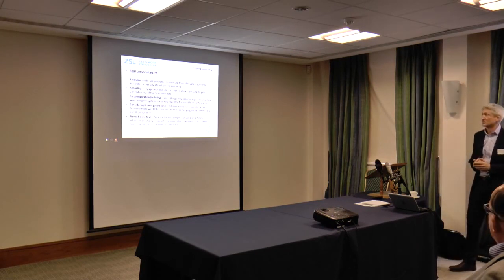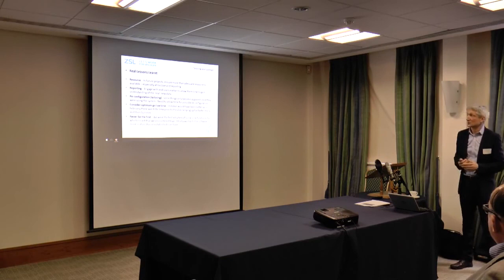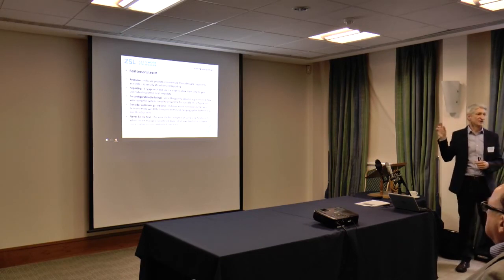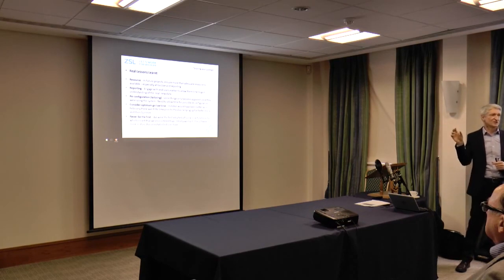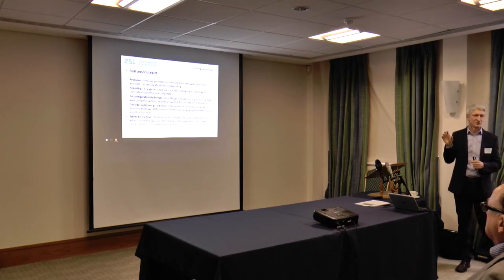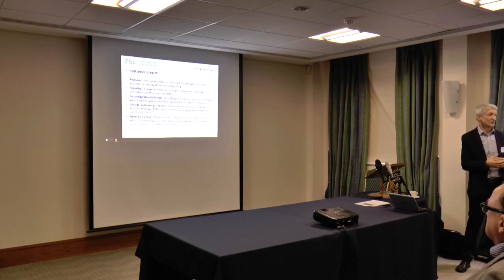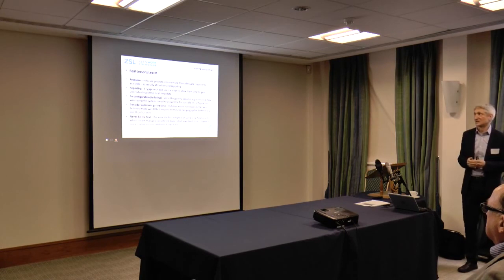I've touched on most of them, but I will give you just a quick flavour. So, resources. At go live, we didn't have enough resource, even though we had the vendor on site, even though I had more people in the team than we previously had. We could have done with another 2 or 3 people for a month or 2. We didn't factor that into any of the planning, we didn't have a budget for it, but the reality is that the business would have benefited from it, and we should have probably anticipated that.